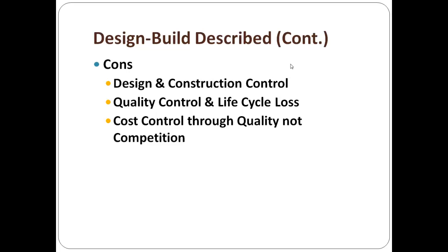And if you, the owner, don't know the difference, then that's a problem. For instance, I'll give you one example here quickly, and that is in many of your classrooms, you'll have a suspended ceiling, and that suspended ceiling has tiles in it that sit on a frame, and you've got 2x4 and 2x2. I've been taught by project managers, by construction guys and suppliers, that you could walk into a supply store and buy a 2x4 ceiling tile for a suspended ceiling, and you might spend, and these prices were given to me, they might be different now, but you could spend $45 or $55, or you could spend $150 or $160, depending upon the specs. They may look somewhat the same, but they're not.